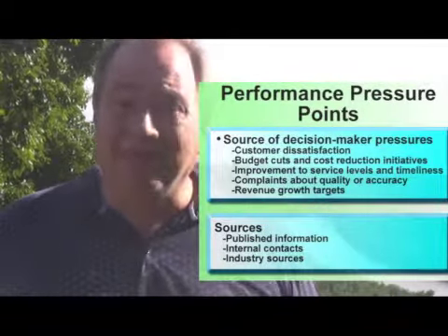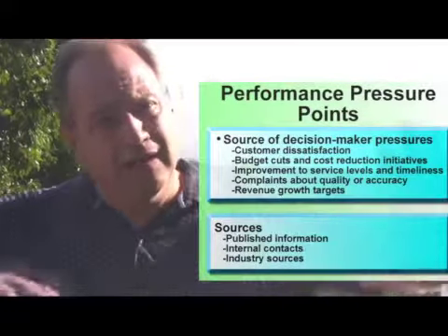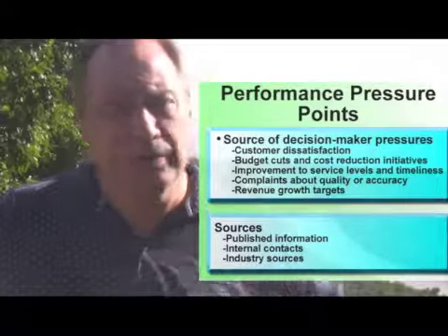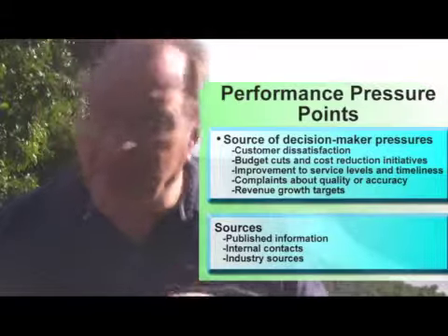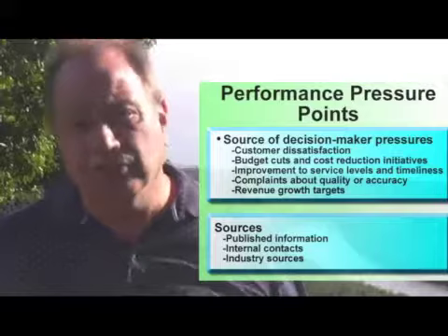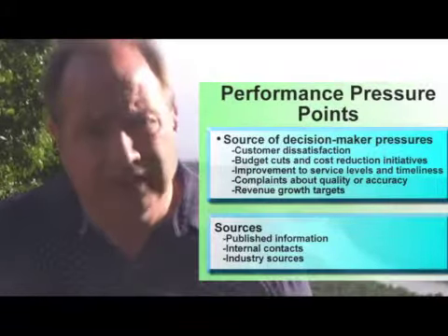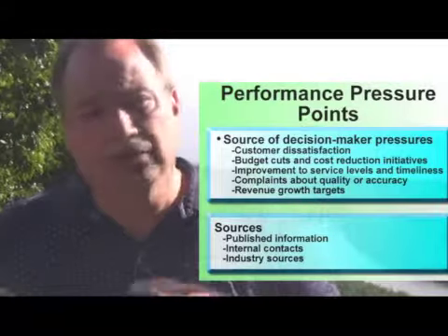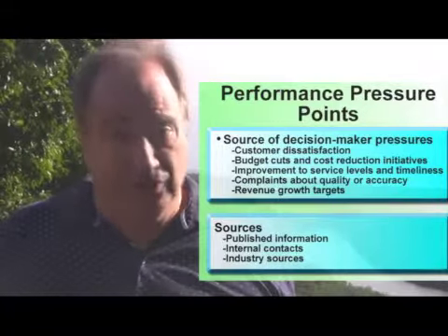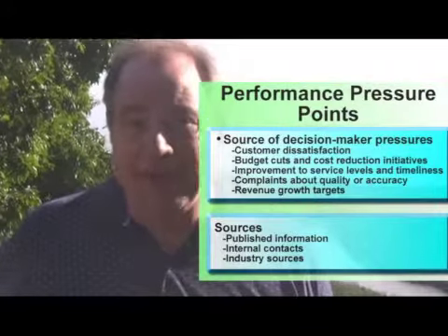and that's the way you find out about them. And then when you go into the customer service manager's office, you're saying, well, now, are there some issues? Are you looking to make some improvements in how long people are on hold? Or are you trying to improve the accuracy of the information they are giving out to customers? Or when you walk into the sales VP's office, you're asking questions like, well, now, we've talked about this project, but is this going to address the issue of salespeople using the wrong quotes on products? And you're asking those questions, and usually when you've hit a performance pressure, you get a very strong reaction.